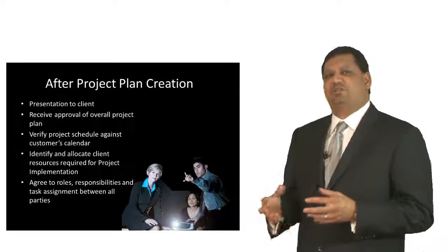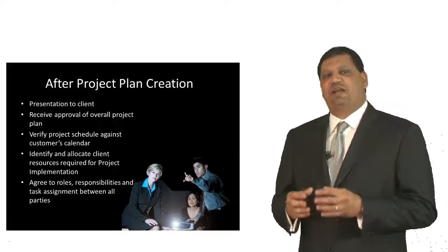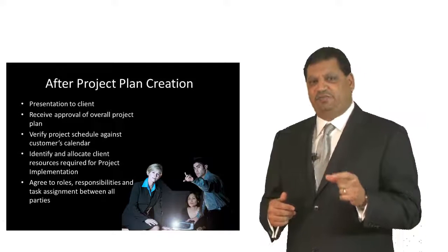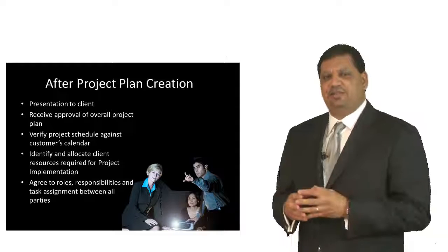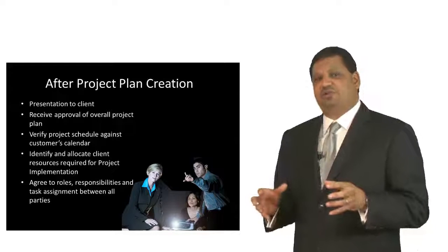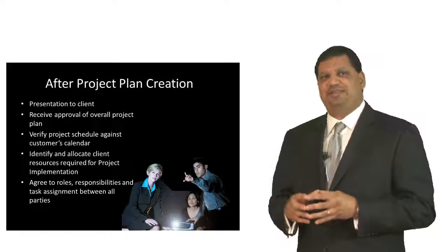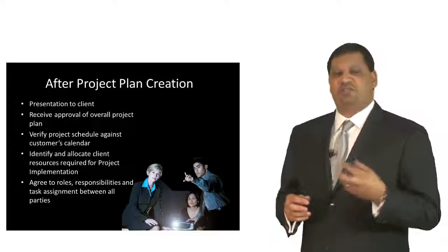After your project plan has been created, you're going to present it to your client, who's going to provide you approval of the overall project plan and acceptance of the plan itself. You're going to verify the project schedule against the client's calendar, as well as other vendors and fulfillment partners, to make certain that your timelines are still good. You're going to identify and allocate client resources that are required for the project's implementation.